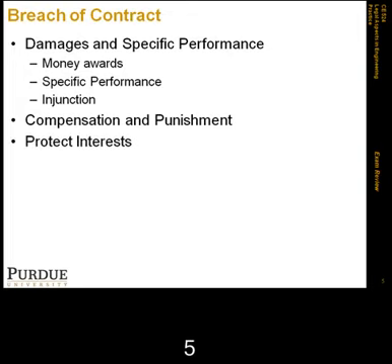We talked about how judges look at the interests of parties. Judges look at three main interests that they need to protect. One is restitution, which is the most protected. It compensates parties for their actual losses or for actual cost or the value of their work.